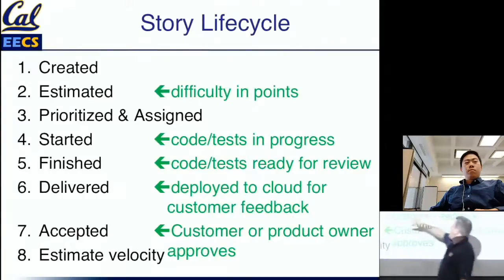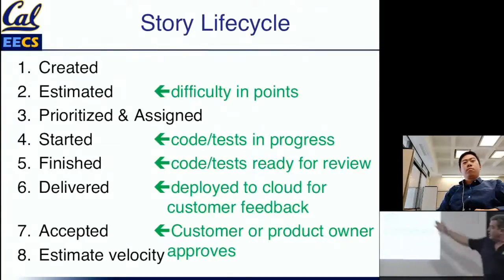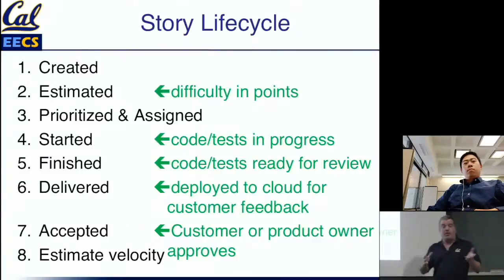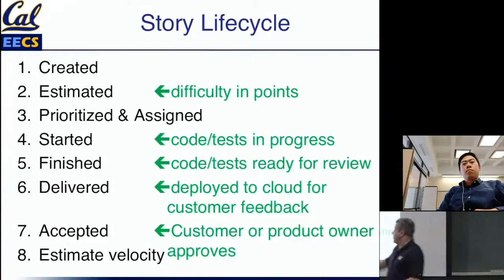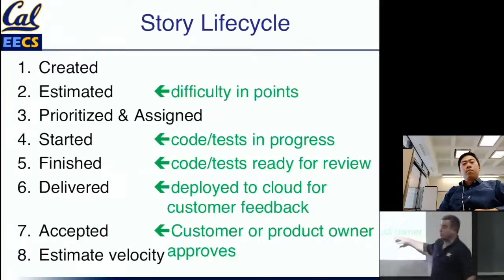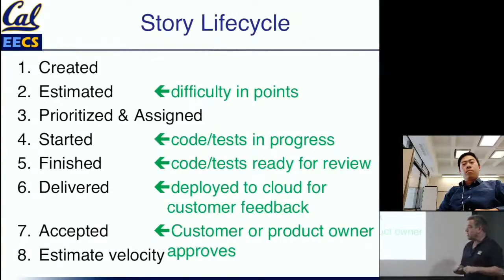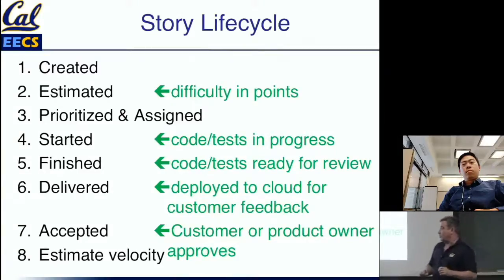Delivered has a specific meaning. It means that it is deployed somewhere that the customer can see it. Probably in your case, it'll be deployed on Heroku in like a staging environment. And then when the customer, or the product owner if the customer is not available, actually inspects and interacts with the deployed feature and agrees that it matches what was said in the customer meeting, then the story becomes accepted. That's when the story is finished and not before.